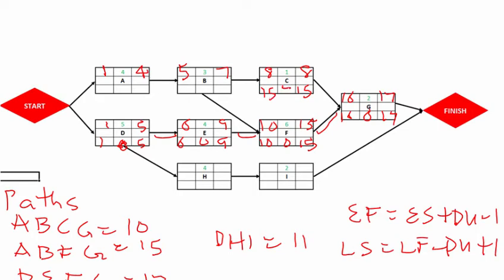And of course, the float is 7. That's the float is equals to late start minus early start, or late finish minus early finish. And when you have a scenario where there's a divergence going on your forward pass, a divergence between activities B, C, and F, meaning that C and F can only start after B is finished, in this scenario, you go for the successor with the lower date, or with the earliest date, and that is activity F.